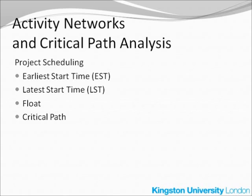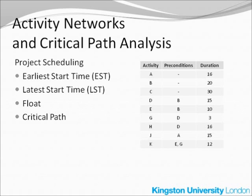To draw the activity network of the project, we need a list of all the activities. You can see them here, labelled from A to K. We usually don't use the label I because it would be a bit confusing with J. For each activity, we determine the preconditions, or the set of other activities that must be completed before the given activity can start. As you can see, there are no preconditions for activities A, B, and C, meaning these activities can start immediately after the project initiation.